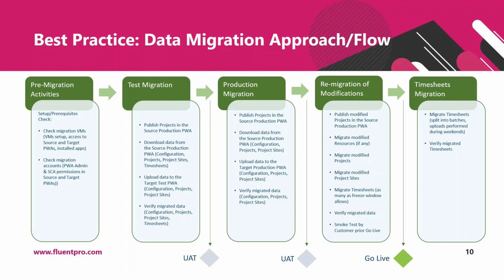Each portion of the data, each upload of the data should be followed by verification process. So once configuration is uploaded, this data should be verified, and we recommend not to proceed with the next steps till the previous portion of the data is verified, and if there are any issues, these issues are addressed and resolved or mitigated. So PWA configuration, projects, project sites, and timesheets should be verified after they are uploaded.